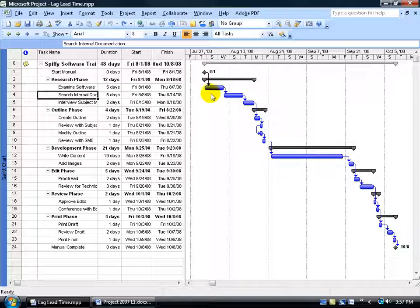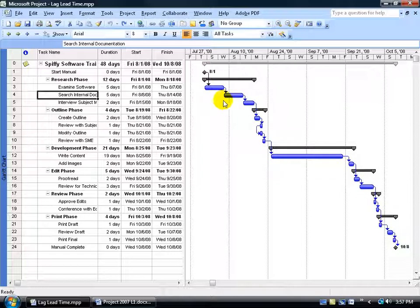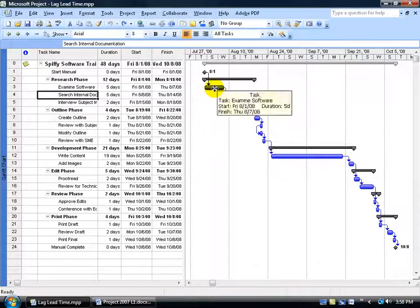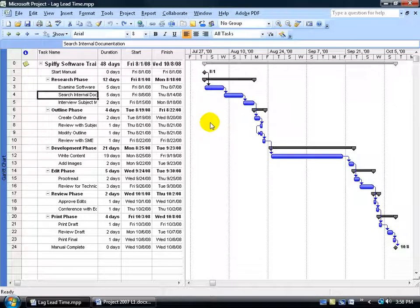Now for your lead time, let's pretend this task is moving all the furniture out of a room. The next task would be to vacuum the carpet. Do I have to wait until all the furniture's moved before I start vacuuming? No. Once they have a clean spot, I can just begin vacuuming, so I can give it some lead time or start a little bit earlier or overlap into its predecessor task. Let me show you what it looks like.